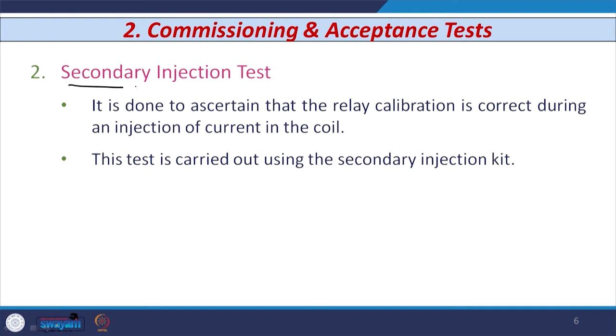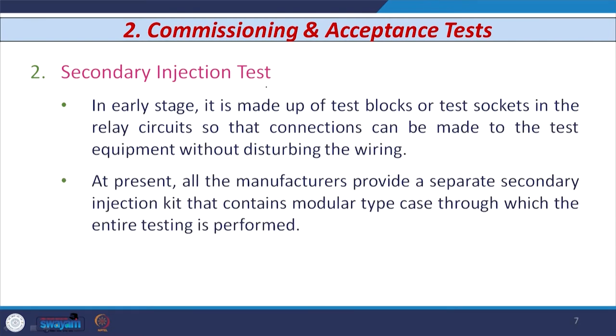The second type of test is known as the secondary injection test. This test is carried out to ensure that the relay calibration is correct during the injection of current into the current coil. This test is carried out using a device known as the secondary injection test kit. In early stages, manufacturers provided test blocks or test sockets; nowadays, separate secondary injection test kits are available from different manufacturers.